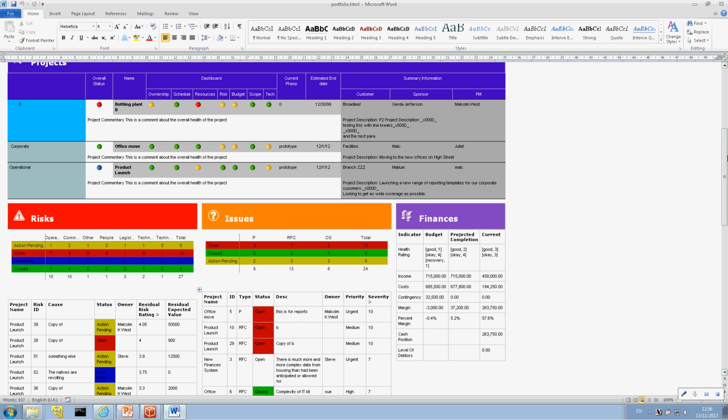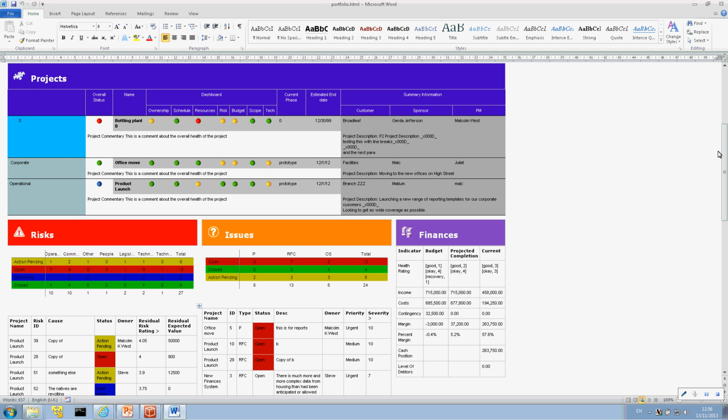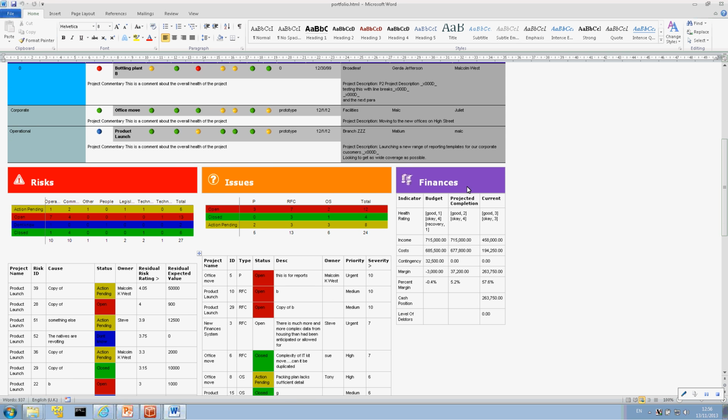All that done from the view. So the view that you might be using in your general day-to-day analysis can be repeated straight away into these reports again. Now finances, you'll remember, come from a spreadsheet. In this particular case, we've got the same spreadsheet in each of the 6 projects, and it has, if you like, the instructions on how to process those when you merge them together. We get the same resultant table size and shape, but we merge the data that comes from each of the projects to, in this case, count, in this case total, etc.